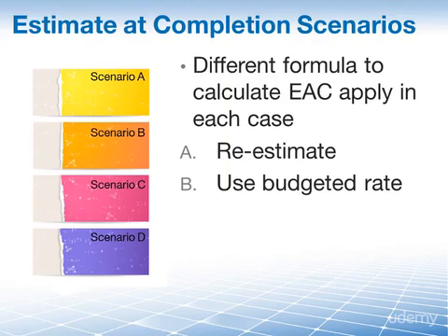is more accurate than your current project performance. You consider the variances that you have experienced so far. They're unusual, and such variances are unlikely to continue for the remainder of the project. For example, you know that you are above budget because 3 of your engineers have been sick with a cold for 10 days last month. That's why your numbers are off. But now that the flu season is over, you don't expect to have such a major loss going forward.